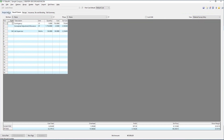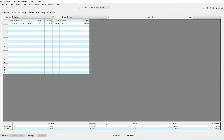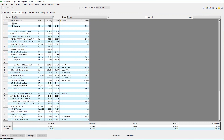We'll use a different estimate to discuss formulas and variables. Formulas and variables will be like the algebra that you learned back in middle school. Variables can either be declared in each bid item and reset when they are used, or global variables that are used throughout the entire estimate. Variables are then used in formulas. This is a global variable — the formula is: quantity equals ACLG, which is the global variable that was declared. Here you see a more complex variable where we're multiplying factors against the variable to come up with the quantity or the price.